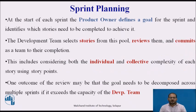At the start of each sprint, the product owner defines a goal for the sprint and identifies which stories need to be completed to achieve it. The development team selects stories from this pool, reviews them, and commits as a team to their completion. This includes considering both the individual and collective complexity of each story using story points. One outcome of the review may be that the goal needs to be decomposed across multiple sprints if it exceeds the capacity of the development team. The team also plans how they will work together to complete the sprint.